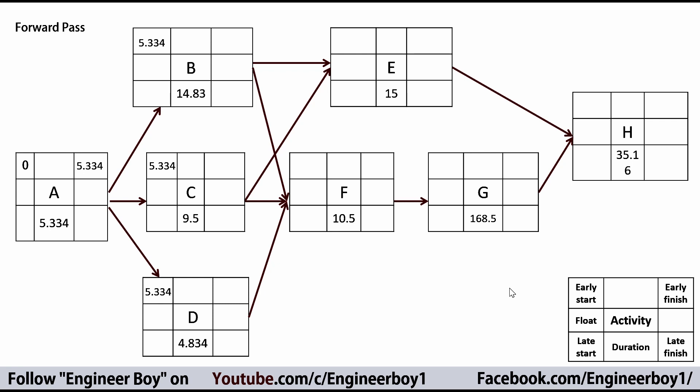Adding the duration of each activity to its early start gives the early finish. For activity F, which has three predecessors, we take the maximum early finish from B, C, and D. Activity D has the least time, activity C is medium, and activity B has the maximum — so the early finish of B, which is 20.163, is forwarded to F.